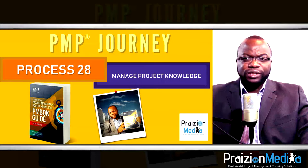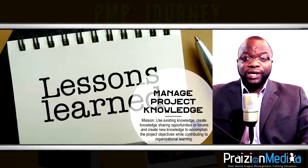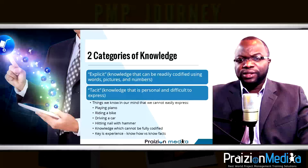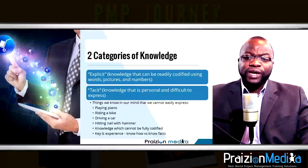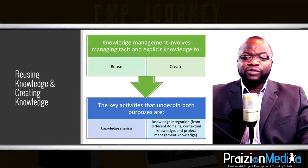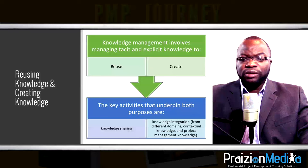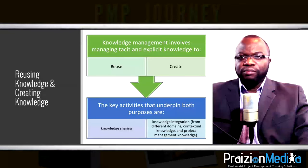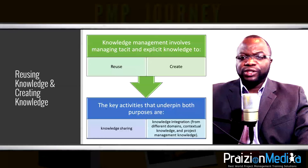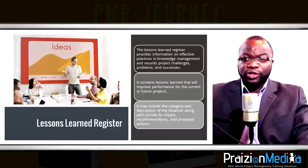Process 28: Manage project knowledge. We consider two types of knowledge: explicit knowledge, which is easy to codify but difficult to contextualize, and tacit knowledge, which is easier to contextualize than codify. Project managers and teams should obtain this knowledge from experts, and provide a conducive, trust-based environment for sharing — such as communities of practice, networking events, coaching, and mentoring. Much of this can make its way into the lessons learned register.